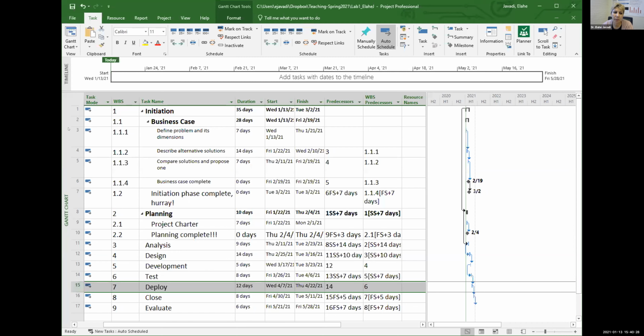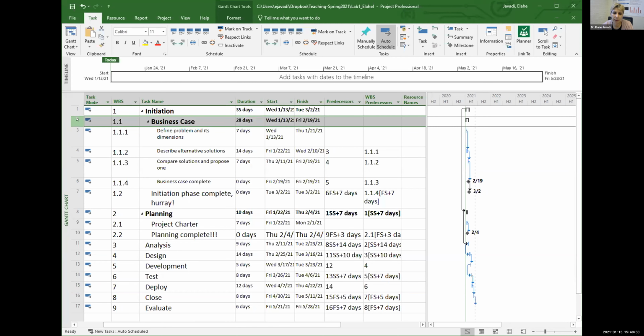And thus, you follow the phases of the systems development lifecycle. Now, who remembers what goes under a phase? You were here on Monday. We talked about a deliverable oriented work breakdown structure, and this is what you see in front of you. You decompose the big project to phases, as your classmate just said, and then phases to deliverables.